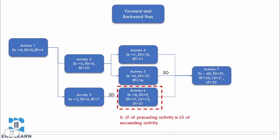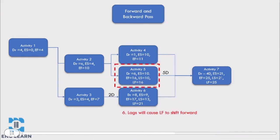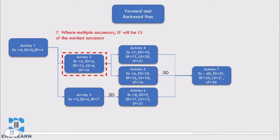So for activity 6, the late finish is day 21, which is the late start of activity 7. Any lags will cause the late finish of the activity to shift forward. So for activity 5, the latest that activity can finish before it delays activity 7 will be day 16, as there is a 5-day lag between them. If it finishes later than that, it will prevent activity 7 from starting on its late start date, day 21. When multiple successors exist, the late finish date will be the earliest late start of its successors. So for activity 2, since activity 5 needs to start on day 10 before it begins to delay the project, activity 2 will need to finish by day 10 to prevent delaying the project.